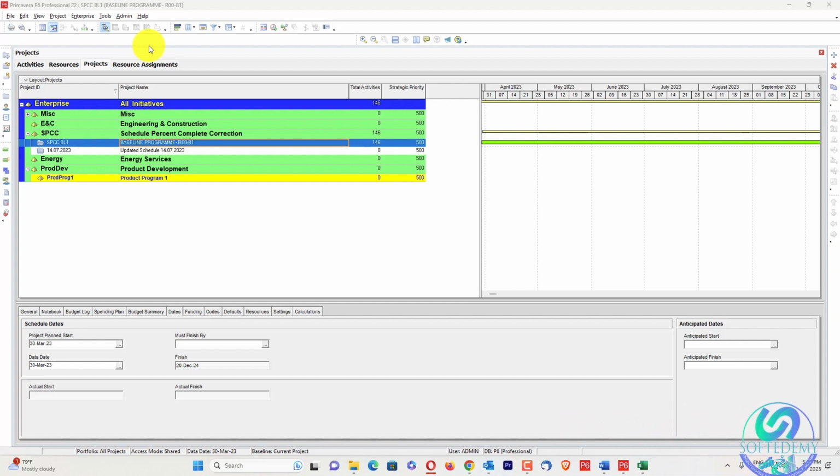So planned value cost is generally based on the baseline schedule, and that baseline schedule already exported resource assignment data, which has a planned value cost and some earned value cost while we monitor. So that exported data does not match with your schedule percent complete every week when you update your data, or any monthly progress report, and when you run your schedule, your schedule percent complete is not matching with your resource assignment.